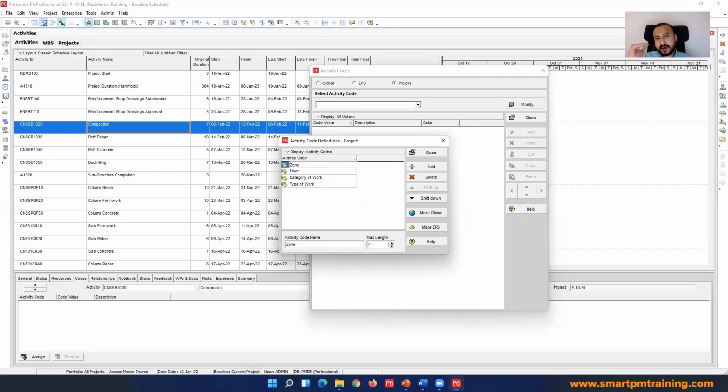For my zone here, it's my highest level. So that's my level 1. Floor is level 2 in the breakdown. Category of work is level 3. Type of work is level 4. So later on, when you ask me, I want to have really laser focused analysis about activity level, like block, plaster, like the lowest level in the funnel. So don't confuse yourself what initially the description was in your assumption. You just go to level 4. That's your lowest level.